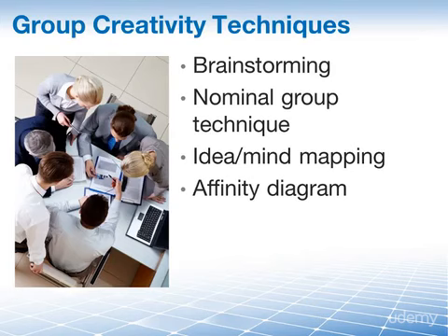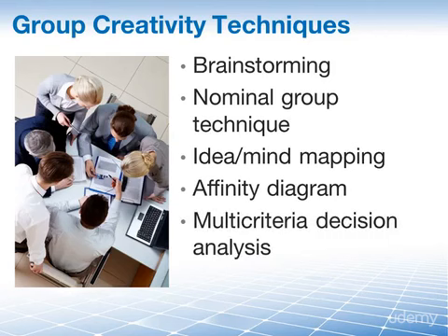And finally, we have the multi-criteria decision analysis. This is an analytical technique where participants use a decision matrix to evaluate and prioritize ideas using evaluation criteria such as business risk and customer value.